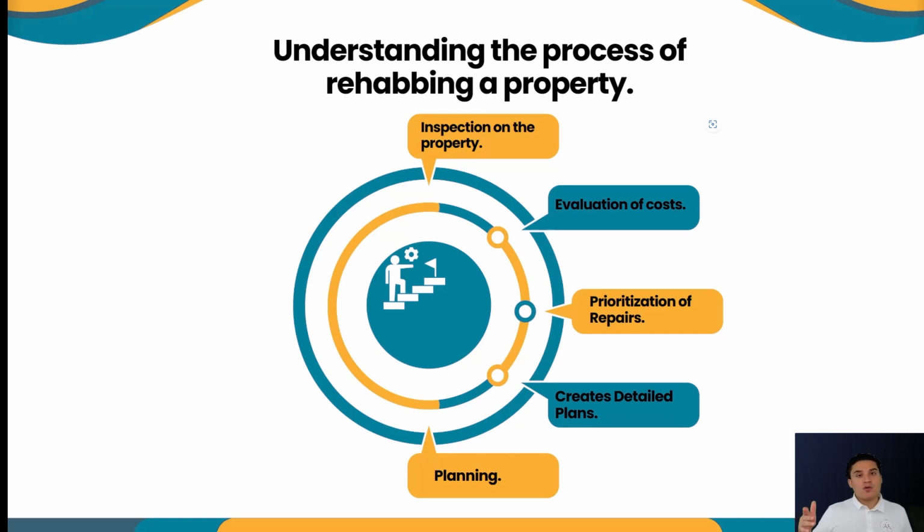A roof, I know if the roof is about 1,000 square feet, or maybe the space itself is 1,000 square feet, maybe it's only going to cost me $7,000 to change the roof. So now I know specifically how much it may cost me, but either way, I do the math where I'm putting these expenses as big as possible and then calculate my profits. Okay, so this is something you always want to do. This is something you always want to remember. Memorize the costs so you can evaluate them and make better decisions when you're buying the property.